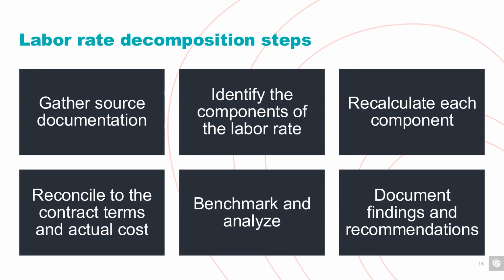As you perform this reconciliation, you're going to compare these actual costs that you've recalculated to the rates proposed by your contractor. So you're going to perform these two steps in conjunction, and then you're going to benchmark and analyze the decomposed rates to local rates that you've observed in the industry. Could be local prevailing wages or other industry benchmarks to identify any variances. And then along the way, you're going to document your findings and recommendations.